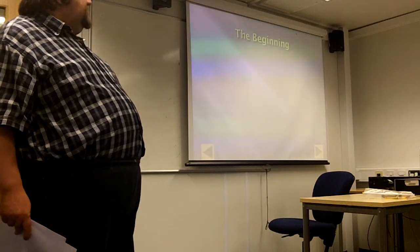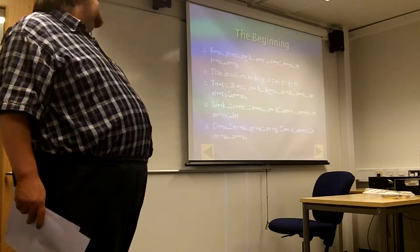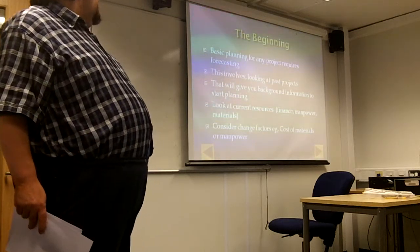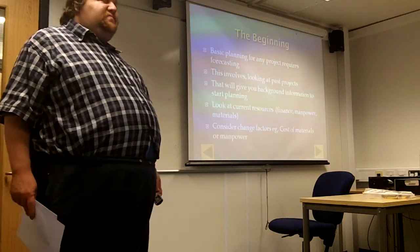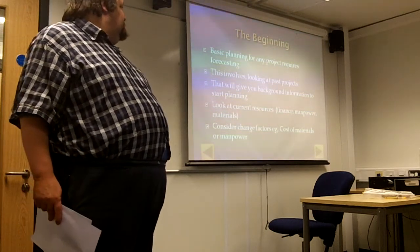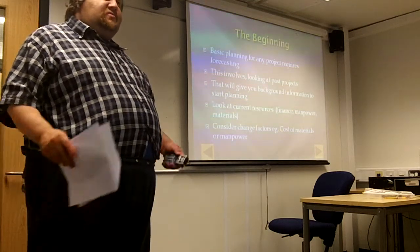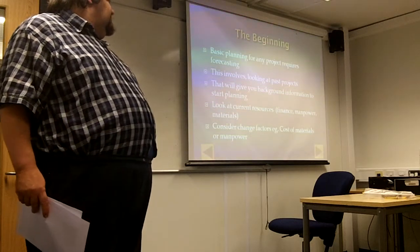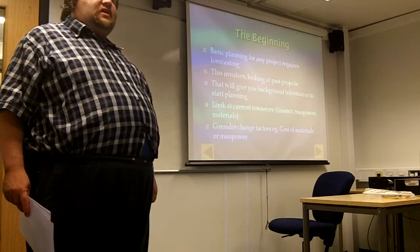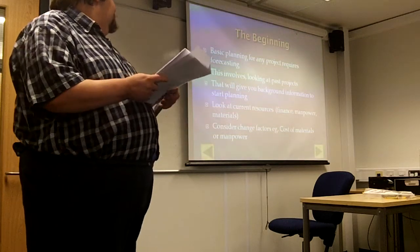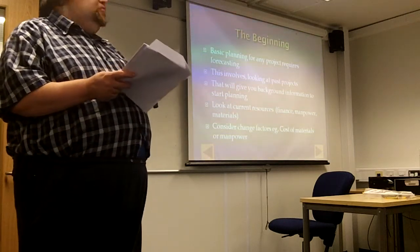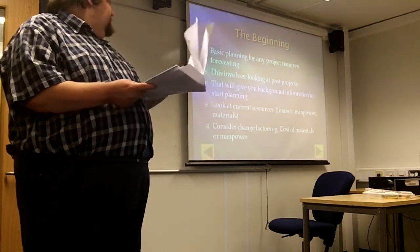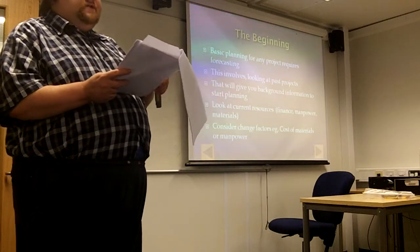Going back to the beginning of a project — the first part of any project requires forecasting, which means you have to look at previous projects you have undertaken. This gives you background information to help you start planning. You look at your current resources: how much budget you have, what manpower you have, what materials you have, and consider the change factors involved. Materials could have gone up in cost since your last project, and your manpower could have increased or decreased.